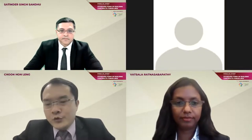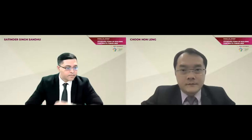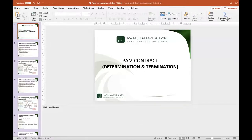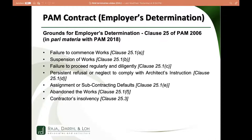Thank you, Satinder. I'm looking at determination and termination. The first question people will ask is why are there two different things — determination and termination? We'll come to that later. From the PAM contract, the term used is always 'determination,' always followed by 'determination of employment.' The grounds under Clause 25 for employer determination are: failure to commence work, suspension of work, failure to proceed regularly and diligently, persistent refusal or neglect to comply, assignment or subcontracting, abandonment of works, and contractor's insolvency.